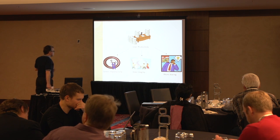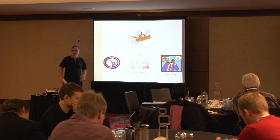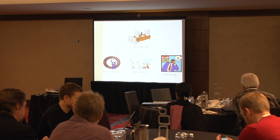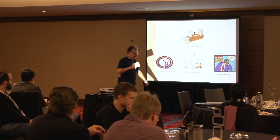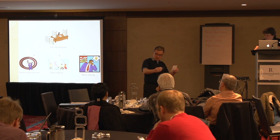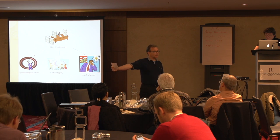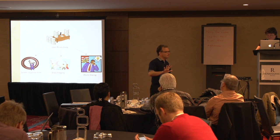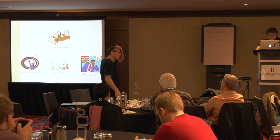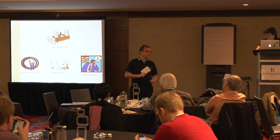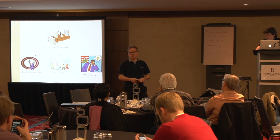When we went through this exercise, I asked: how much slower is the screen repaint because of this CapTaris layer? About 25% slower than it needs to be. Now, think back to the work scenario — receive a piece of paper, look it up on screen, check it off. The majority of their work time is spent waiting for the screen. So if I can make that screen display 25% quicker, I can easily gain 20% productivity back from the team when they're in front of their system. That suddenly became a very compelling argument for the product owner as to why we should do that particular story.